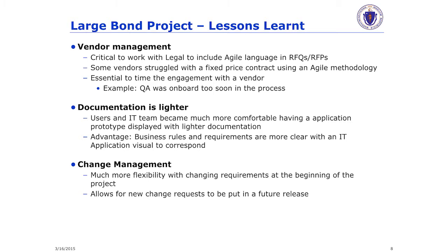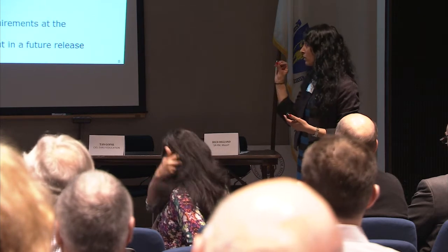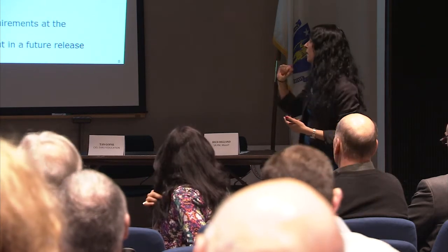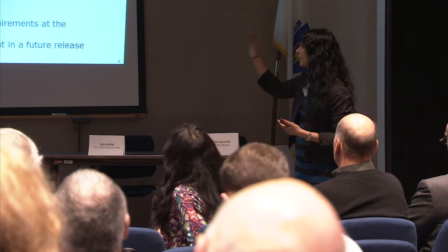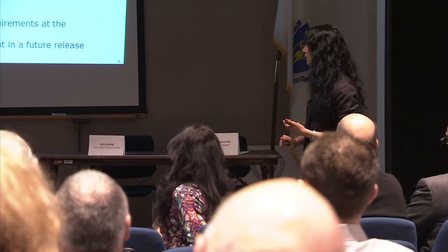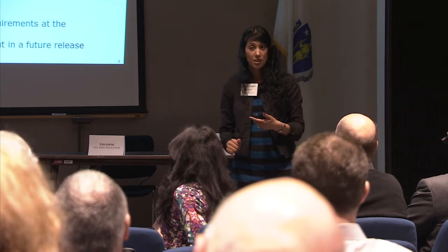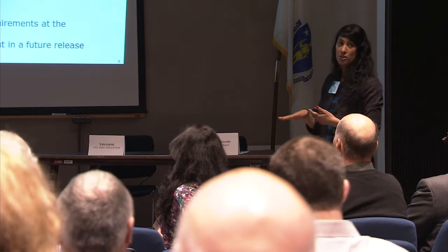Lessons learned. This is another major question people ask me about vendor management. All of our projects are different. When you have a large project, more than likely you're going to be working with more than one vendor, correct? So it's really important, and I know this is going to be one of the questions that comes up at the panel, make sure you're working with legal so that you can add some language on Agile or Scrum into your RFX ahead of time. Traditional vendors are going to struggle with this concept, and they're going to push back on you if you want to do fixed price.